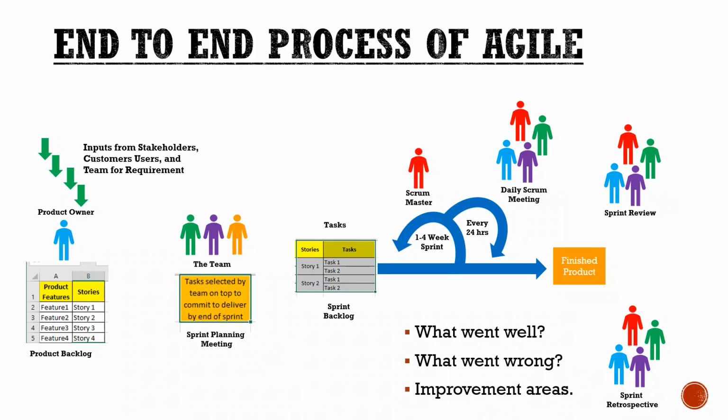You will compare it with the existing product backlog, and you will plan for the next sprint activity, what are the things we need to deliver to the client. So this is how the process will go completely, every time it goes for an iteration, every sprint. One sprint completes, the next sprint will come based on the product backlog and sprint backlog.